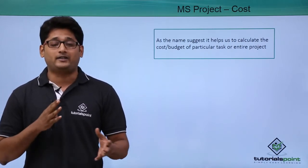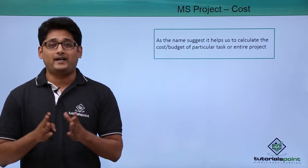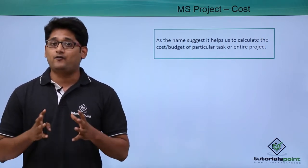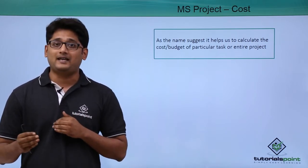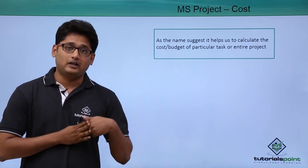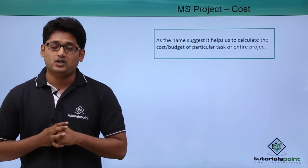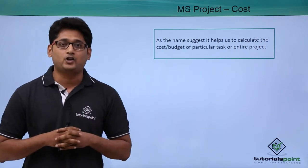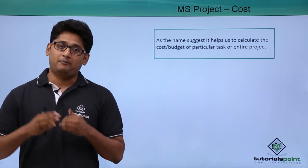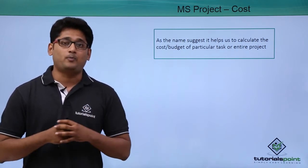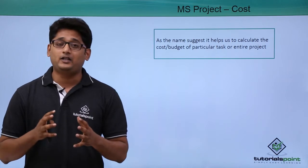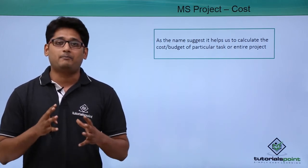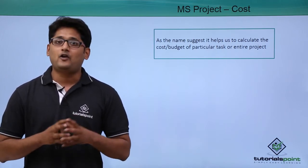of a particular task or the cost of the entire budget. Cost involves the assigning of resources. The cost will only come into picture when there is a particular resource assigned to a particular task, and a resource comes with a price. We need to calculate what is the total budget of our project